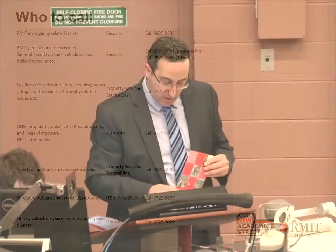So, as I mentioned, when the issue comes through to those service centres, they will transfer the issue through to our team. Depending upon that issue, if it's an HR, OH&S related issue, it will go to Kelvin. If it's a timetabling related issue, it will come to myself. We will then work with Marcus and the landlords to work through the issue and get it resolved.